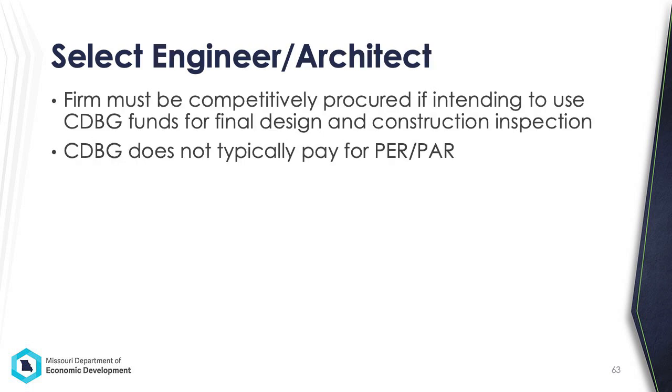Most CDBG projects outside of demolition projects and certain emergency projects require the services of an engineer or architect to assist with preparing the application in the form of a preliminary engineering report or architectural report and subsequent final design. The firm must be competitively procured if intending to use CDBG funds for final design and construction inspection. The RFQ process will be discussed in Thursday's procurement session.